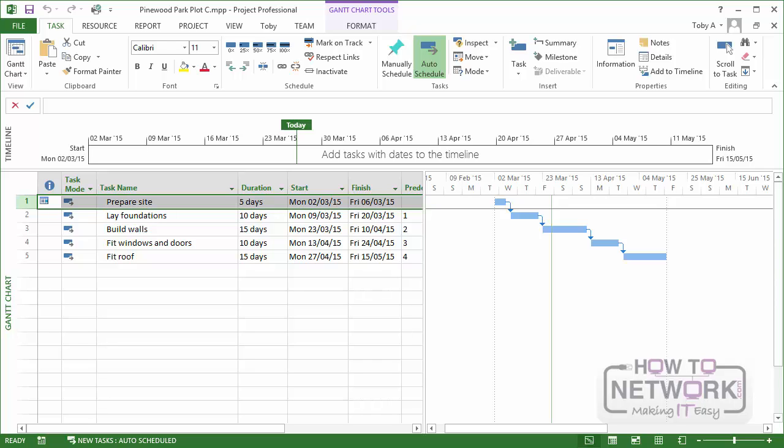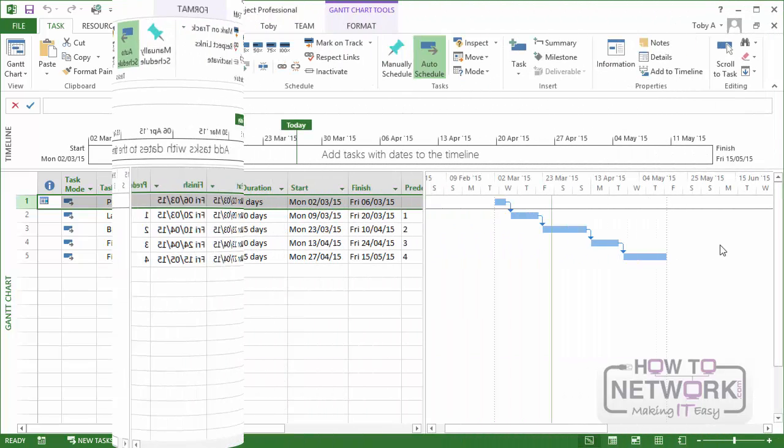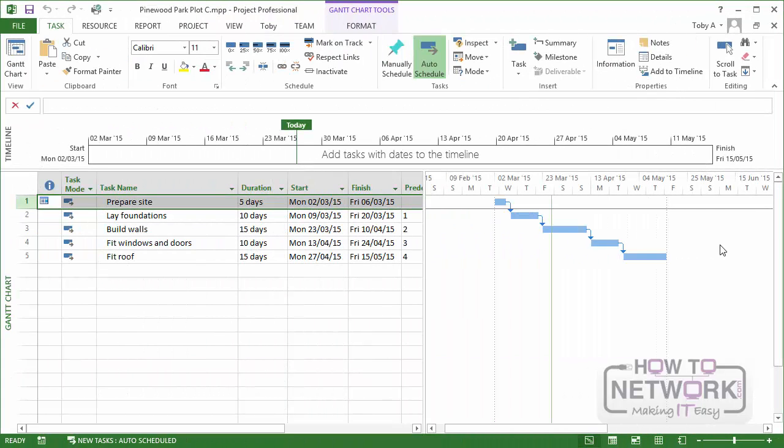So you're talking about limitations on tasks which do not prevent or inhibit scheduling, but which can be very useful. Now, apart from the fact that deadlines aren't used by Microsoft Project when it tries to create a viable schedule for you, it does include deadline information, for example, in certain reports. So you can actually run off a report to say which deadlines are being missed, for example. So let's look at an example of a deadline.